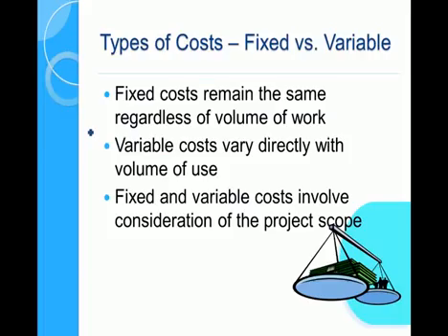So fixed costs are those things that remain the same throughout the project, whether we build 2 stories on the house or 1 story. Certain things like gaining approval or the land, the price of the land is independent of the amount of work that occurs on the project. Variable costs are things like labour. The more work you do, the bigger the cost.